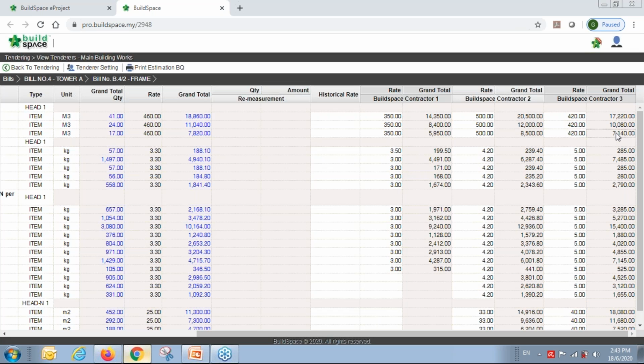Okay, sometimes in e-bidding, the people just want to get the job. Okay, when it comes back to the detailed BQ, they only then realize that it's impossible to complete the job with that awarded contract. So that's a problem with e-bidding also. So these are our differences. Okay, e-tender is more on every detail, every single item rate. Okay, but we can do the e-bidding, but we have another method of doing the e-bidding. In the future, we will enhance our system.